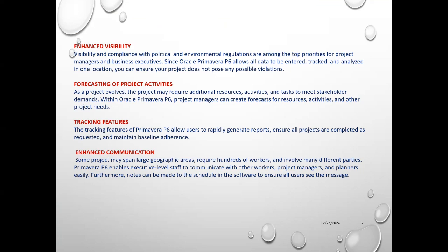If I do the more look ahead, practically that is not going to work, because next month, depending upon the actual progress on the site, this look ahead also will change. So in Primavera, with one click, I can do the look ahead. I will teach you how to do the look ahead schedule.